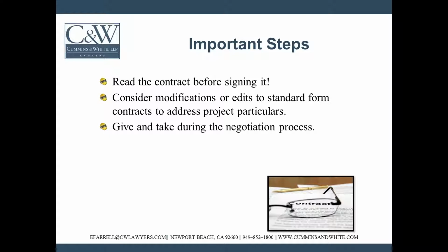Modifications should also address any legal issues on a project. For example, limitation on liability or waiver of damages taken on by a subcontractor. Again, modifications should be understood and proposed if necessary to preserve the subcontractor's rights. Modifications that are proposed are discussed during a negotiation process with the general contractor. The sub should propose those modifications and be prepared for the typical give and take during negotiations to make sure that its concerns are addressed in the subcontract language.